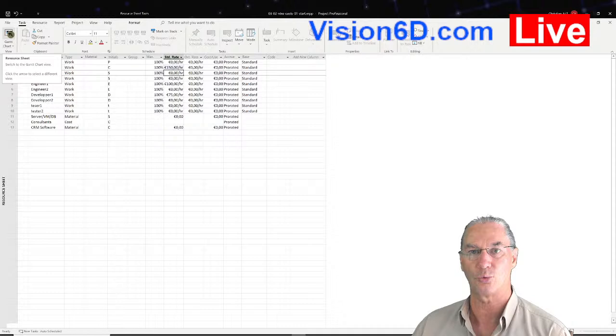Often in companies, your stakeholders aren't billed or charged to the project, but there are cases where they are. And here, if you want to know how much this really impacts the project, you can use that estimation of 150 euros per hour of involvement of those people. So for the moment, we will leave it as such.